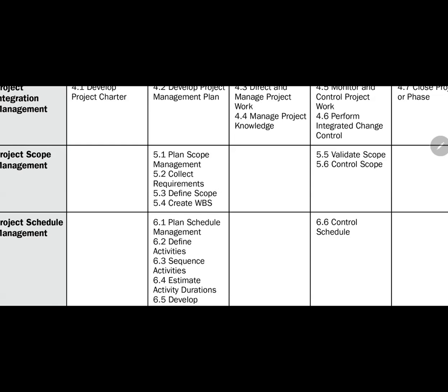The project scope statement, you will use that project scope statement as part of create work breakdown structure. So when you take the deliverable and break it further down to work packages, the smallest elemental level, where you can assign resources, do estimations, and all of that. So you have the work packages, then you have done what you call decomposition, create work breakdown structure. Now the output of this create work breakdown structure is the scope baseline.